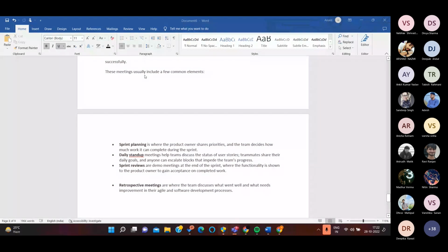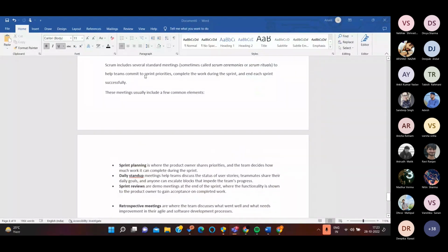So the last part we would be coming across: in Scrum and sprints, and in Agile, there are various meetings that used to happen. We often come across the sprint planning meeting that I have already told you about. Then there's the daily stand-up. So what is the use of a daily stand-up? In the daily stand-ups, the things that need to be discussed are what was completed yesterday, what we are planning to do today, and what exactly the blockers are at that point of time.